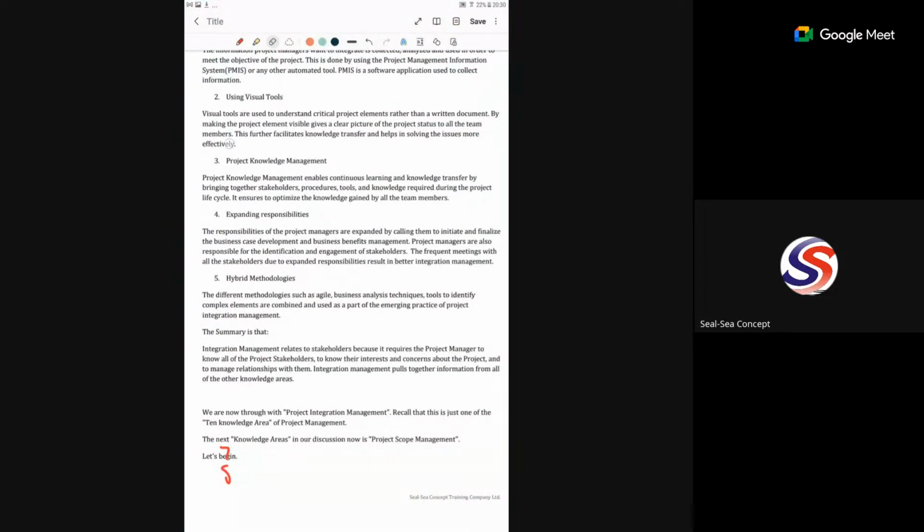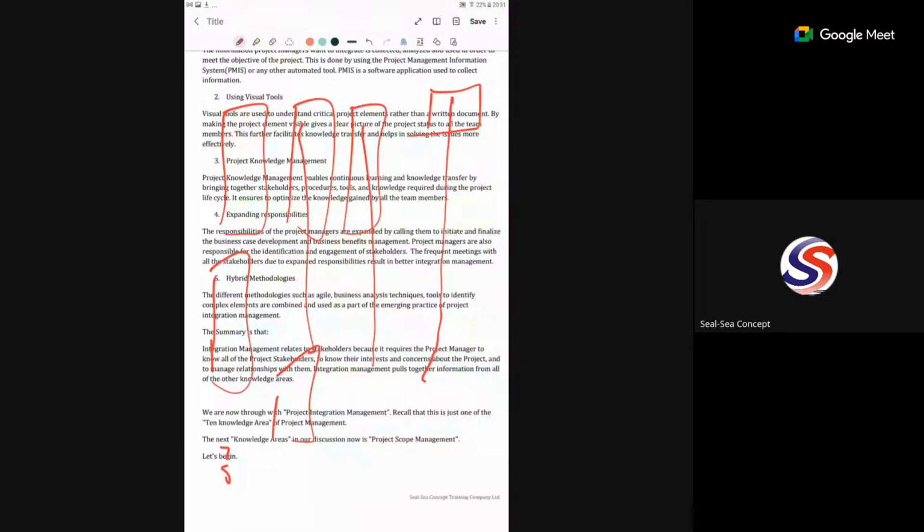So in Trello, you can give different tasks to different team members. It's just like the example that I gave. When they are done with a particular task, they move it down. So when you open it as a project manager, you will see the list of the tasks that they have completed, what they have not done, what they will do next, and all that. So it works like Kanban. In fact, a lot of people that are into programming projects, like web designing projects, use Trello a lot.